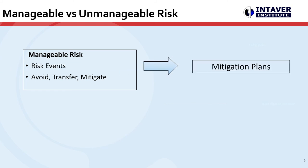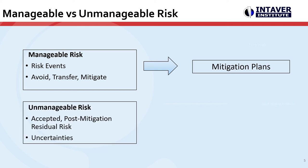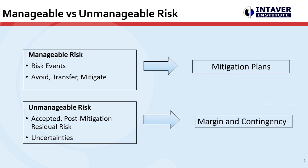After risks have been managed, your project still has unmanageable risk, which is the residual risk left after mitigation activities, plus the impact of uncertainties, which cannot be managed. Unmanageable risk cannot be reduced any further, so it is accounted for with schedule margin and cost contingency. Margin and contingency are set to a cumulative probability percentile that reflects an organization's risk tolerance. The higher the percentile, the lower the risk tolerance of an organization.